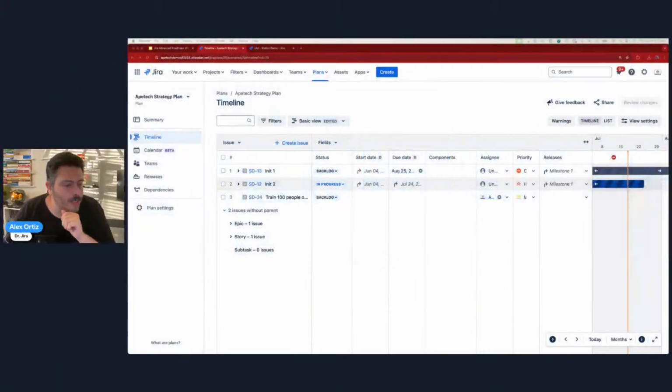So a couple more things you've got to know as a beginner, as a project manager. Once we've created our initiative, go back into Jira. The initiative is just the high level. So now we want to create children. We want to start linking epics to these initiatives. And there are 2 ways to do this.